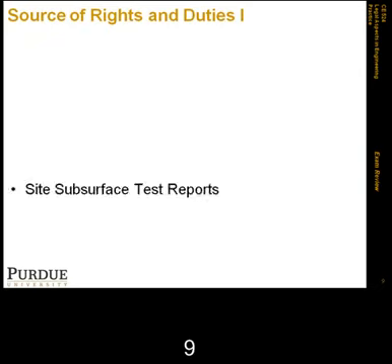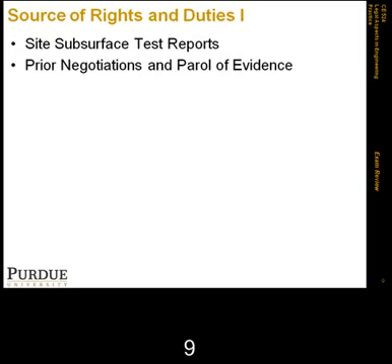documents. And we also talked about something called prior negotiations and the rule that's called the parol evidence rule. The parol evidence rule says that a written agreement and the documents incorporated by reference are a complete agreement of the parties. Prior or contemporary oral agreements are not binding. So this basically cancels any oral agreements that were made before or during the final composition of that written agreement. So this was an important thing.